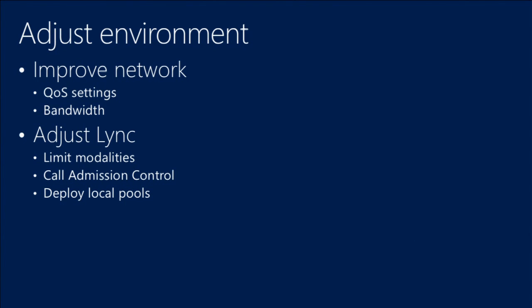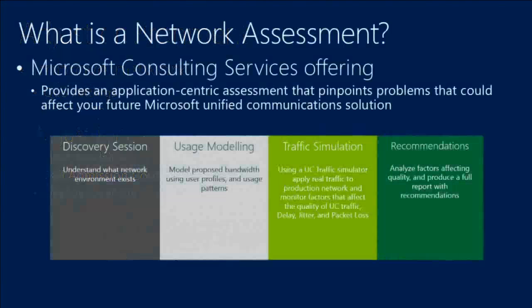Or you might end up with saying, well, we thought it's really a great idea to centralize everything in one particular country and have everyone calling there. However, we can see that the bandwidth is so expensive that it might make more sense to have in a different location an additional pool and keep the traffic local. So there are a number of things that you can do. The thing is just after doing the network assessment, you really know what you need to do. This is just summary slides.